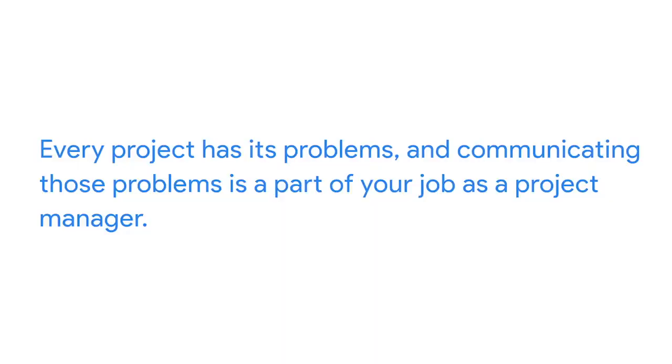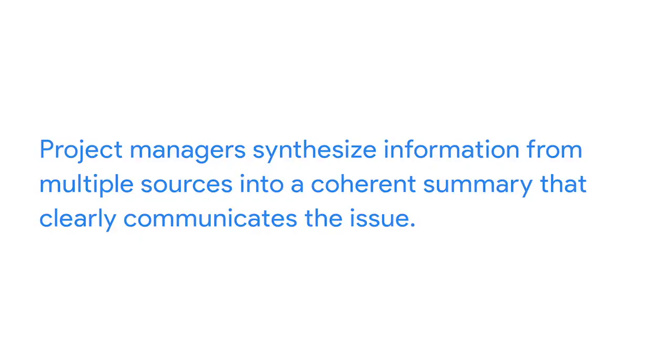Okay, let's discuss project problems. Every project has its problems, and communicating those problems is a part of your job as a project manager. Usually, project problems are small enough to address within the immediate project team. But occasionally, you'll need to escalate problems and proposed solutions to a senior stakeholder for their input and guidance on next steps. Stakeholders shouldn't have to read different project documents or consult multiple email threads in order to understand the project problem. Instead, it's your responsibility as a project manager to synthesize relevant information from multiple sources into a coherent summary that clearly communicates the issue.